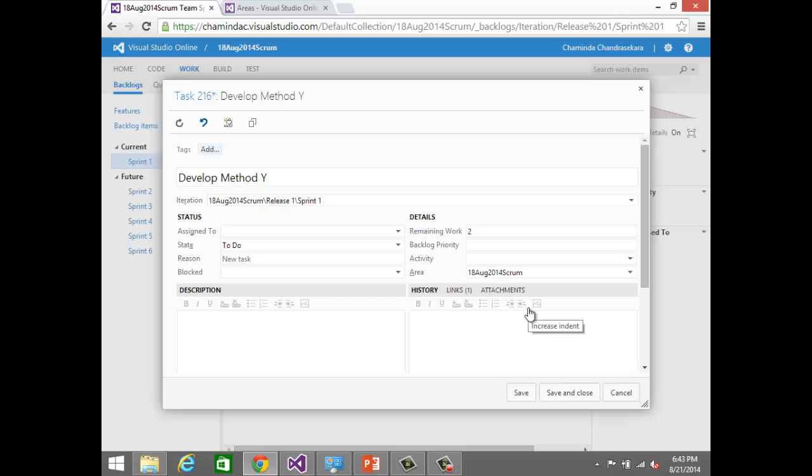Now when you have that, what should you enter when you are creating a new task? These are the things that people do wrong mostly, and then the information is not visible. Always put original estimate and remaining work until you activate a task.